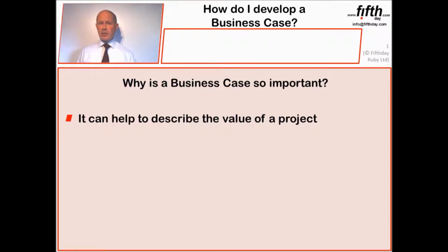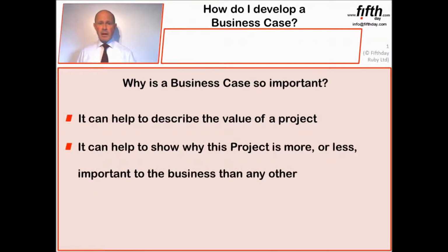However, in any business or in any organisation, a business case can be used additionally for another reason. And that's when we have to start making some decisions about which projects we're going to choose. Any senior management team will have before it a whole range of projects that they could pick on, and in most cases they've only got the opportunity to pick maybe 20–30% of those potential projects that they would like to invest in. So at some point or another they have to make a decision about which projects to discard and which projects to sponsor. The business case can help them to do that. By showing the comparative merits of one project versus another, they can make those decisions.